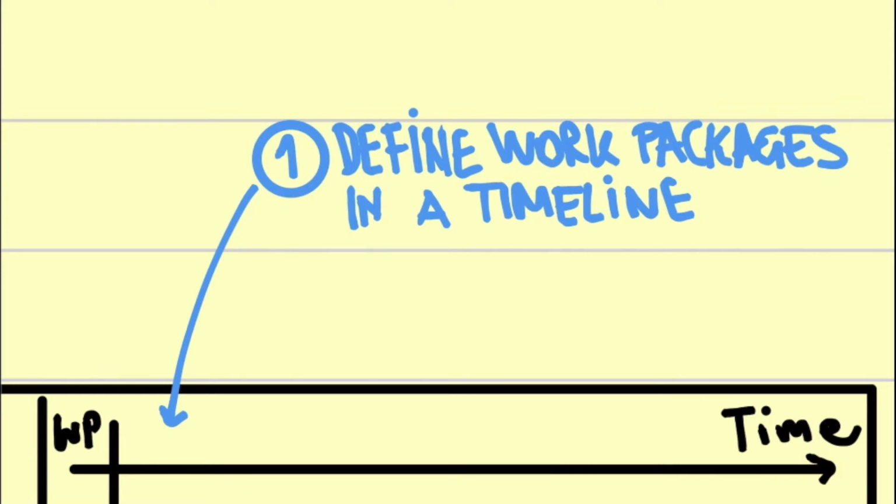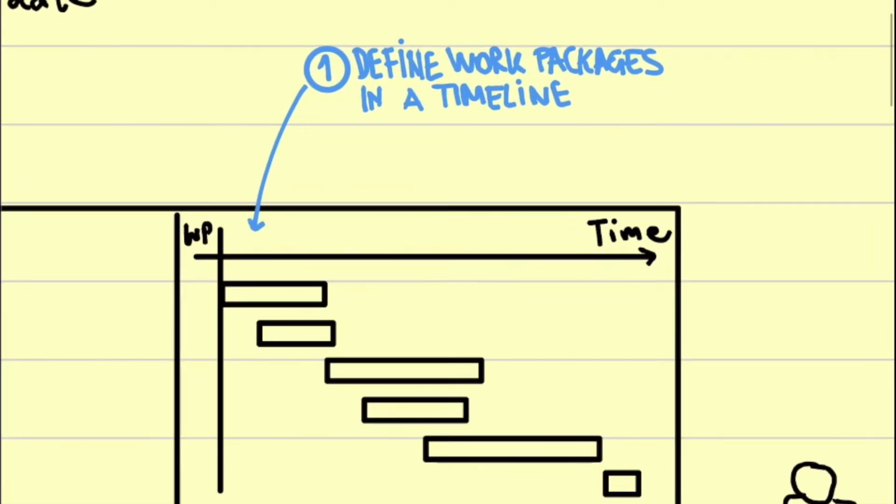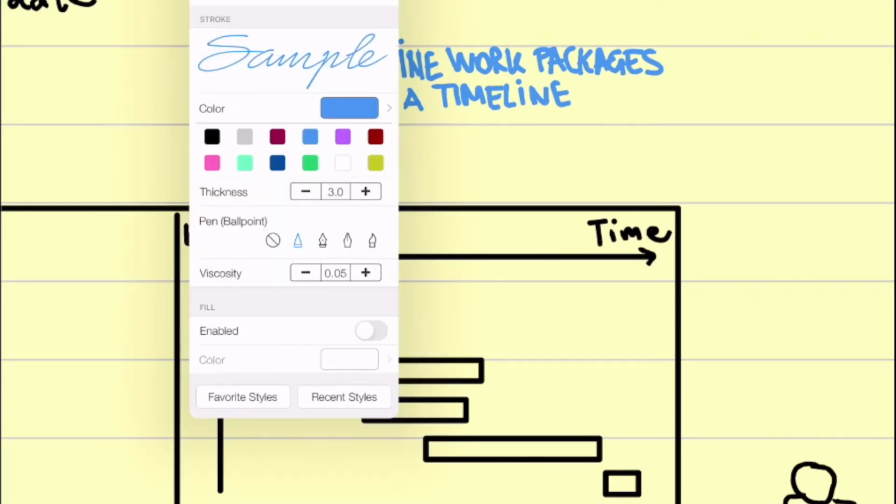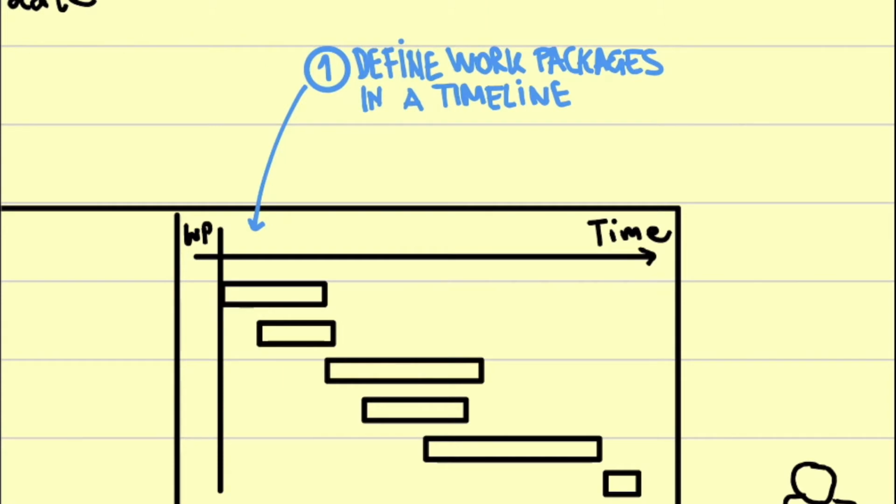The first thing you do, therefore, is you plan. If you want to build a house, you don't plan the first step to build a roof, okay? Your first step is to build the base of the house. Prepare the floor, the ground, then you have the pillars, then you have the structure, then you have the electricity, whatever, okay? The plumbing. You have a rough estimate, and of course, you know the timeline, you know when you want to be ready, okay? So it has a start and an end.